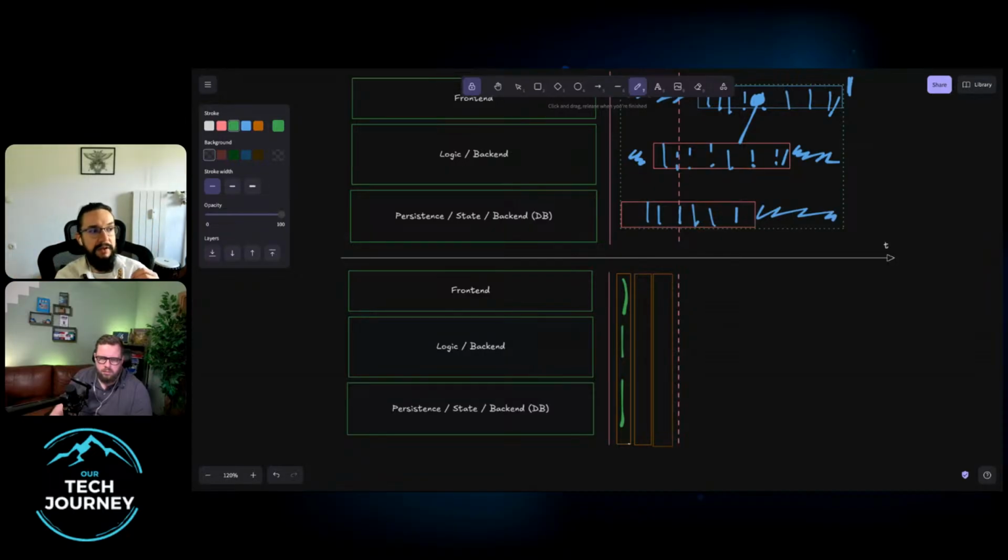So let's say you have a very simple backend and an extremely complex front end. So the work naturally will be more front end focused. But the point is that what you don't want to be doing is moving the horizontal bits forward that in itself are not releasable to the end customer, right? So what we're focusing on is, say, I want something that makes sense to show to the user, even if I'm rolling out a simpler UI.